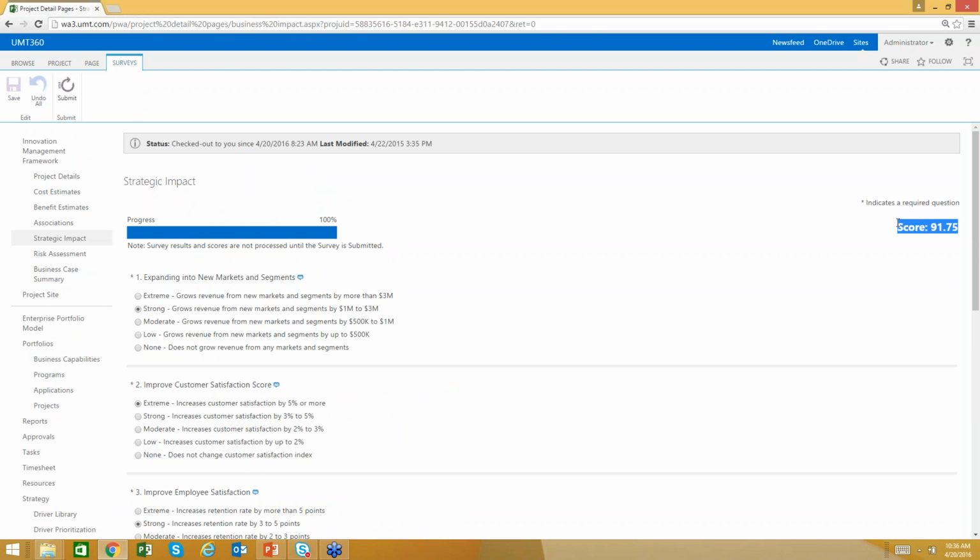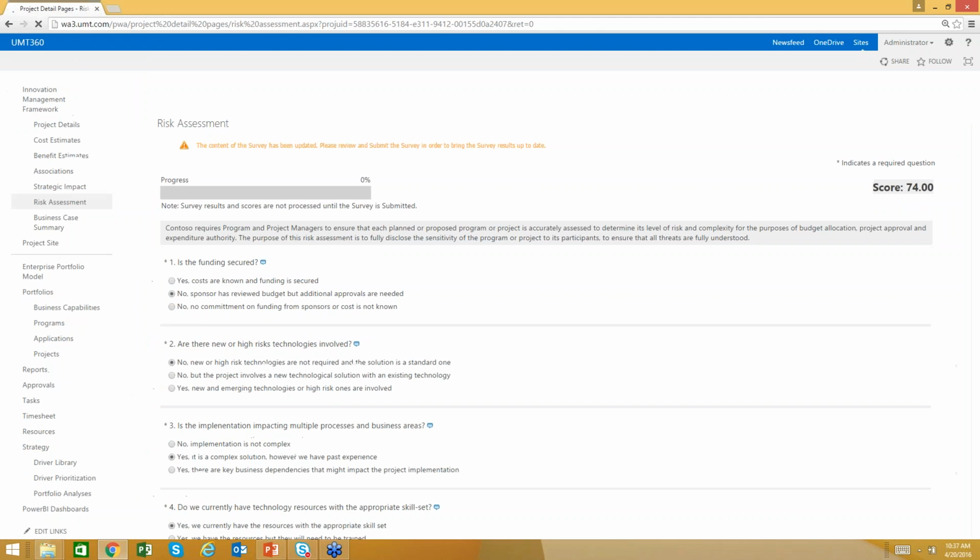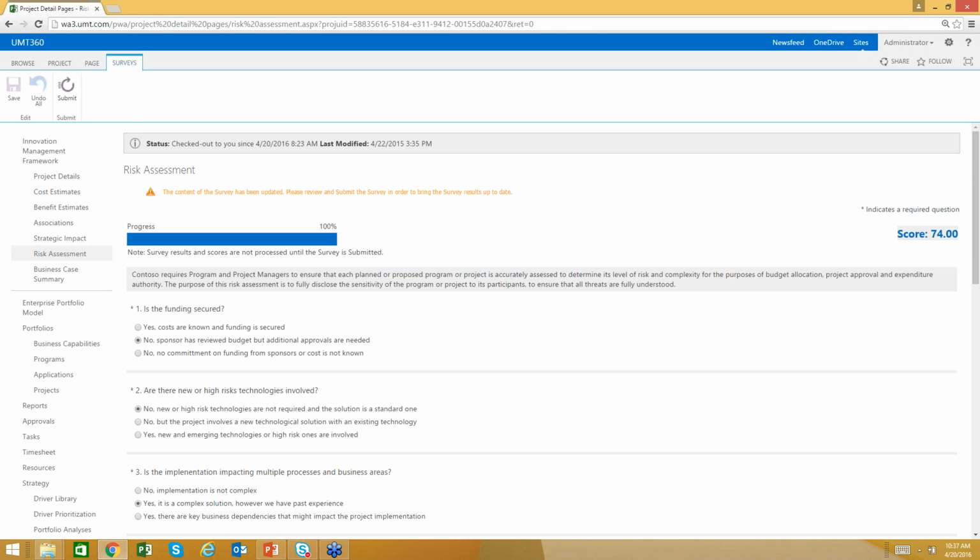But we can also look to derive strategic yield, which is the bang for the buck, value divided by cost. So I can take the value here divided by the cost, and we'll look at that in a second. I can come up with other scoring techniques that comprise other prioritization schema that I may want to utilize. Today we'll be using strategic value as the core prioritization schema, but you can utilize within the analysis any prioritization schema that you like.